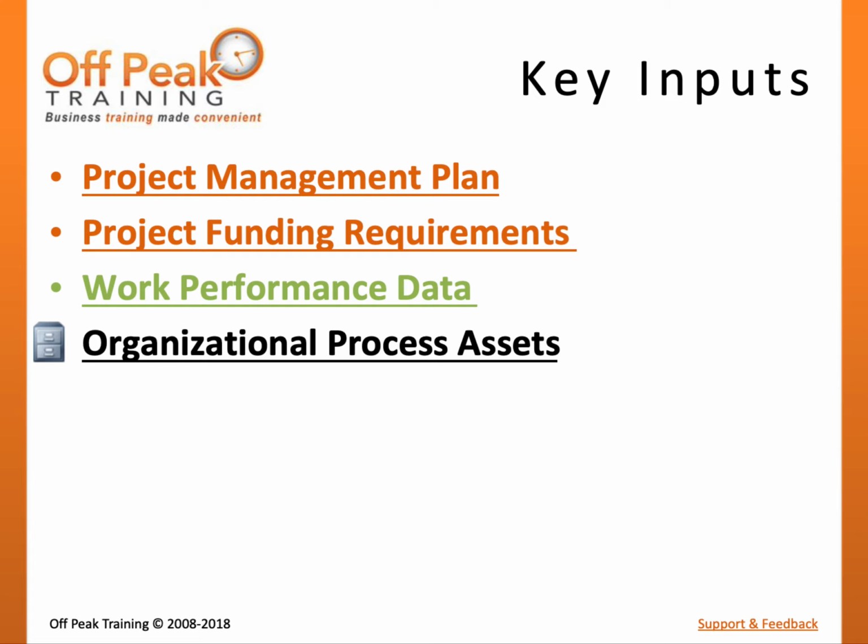Since most monitoring and controlling processes focus on comparing project execution with approved plans, we can expect to find both planning and executing components as inputs. The project management plan includes the cost management plan, which describes how this process should be performed, and it includes the cost baseline, which is the reference point for all cost performance measurement.